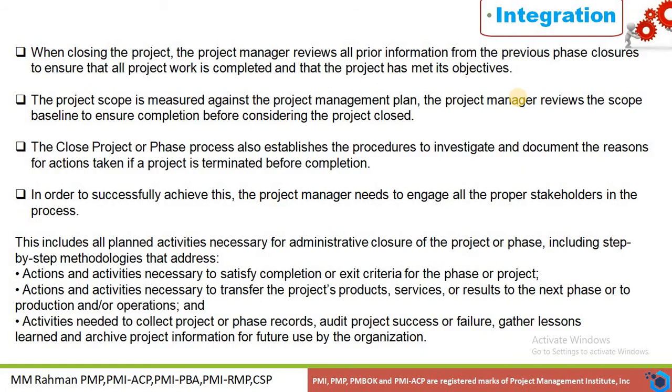This includes planning the activities necessary for administrative closure of the project or phase, including the step-by-step methodology that addresses actions and activities necessary to satisfy completion or exit criteria for the phase or project, actions and activities necessary to transfer the project's product, service, or result to the next phase or to production and operations, and activities needed to collect project or phase records, audit project success or failure, gather lessons learned, and archive project information for future use by the organization.